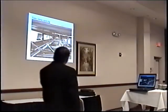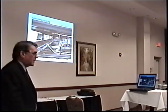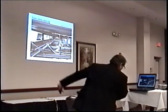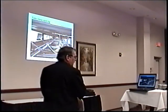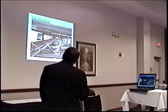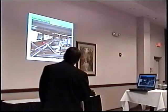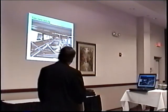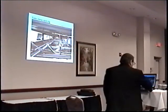One thing about this installation in the building, people think, well, a water mist system, small diameter pipe, should be a piece of cake to install. Well, don't think of it, please, like the standard 13D sprinkler system where you stick some flexible pipe into the attic joist and you don't worry about anything. The work involved in hanger spacing, 7 feet. Look at the structural, these are basically trapezes that span from the bottom flange of this beam to an angle iron over here. These are the tube clamps, tube clamp, tube clamp, tube clamp. Tube clamps had to be so far from each major tee. Beautiful bending work and a lot of money spent on hanger connections.